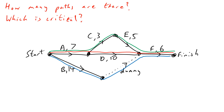An important point on this diagram is this node where all three paths converge. If we follow just the green path coming into this node — 7 plus 3 plus 5 — it takes 15 hours. If we follow the red path it takes 17 hours to get there, and if we follow the blue path only 14 hours to get to that highlighted node. So you can't start activity F until E, D, and B have all been completed.